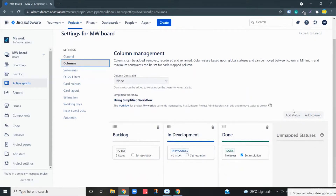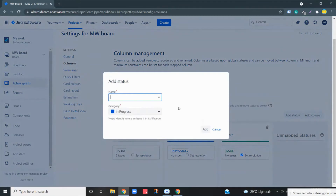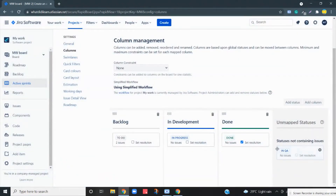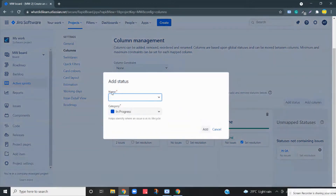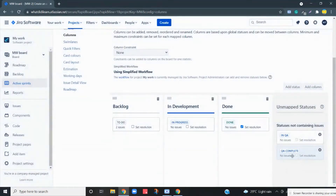Let us add two statuses. Add a status and name it 'In QA' — by this status we mean that this feature is currently in QA. A new status has been created. Let's create another one: 'QA Complete', and let this category be In Progress itself. So we now have two statuses.